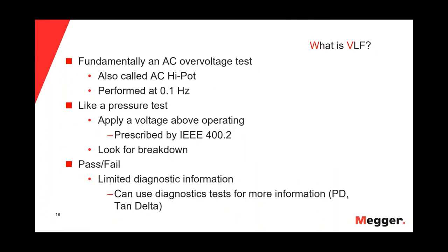Let's talk about the VLF test. Fundamentally, the VLF is an AC overvoltage test — we also call it AC hipot — and we use the frequency of 0.1 Hz. The VLF test is like a pressure test in which we apply a voltage prescribed by IEEE 400.2, and the goal is that the cable holds the voltage during the test time. If the cable holds the voltage, we say the cable is okay and we can energize it. If not, we have a fault. The VLF test is a pass-fail test with limited diagnostic information.